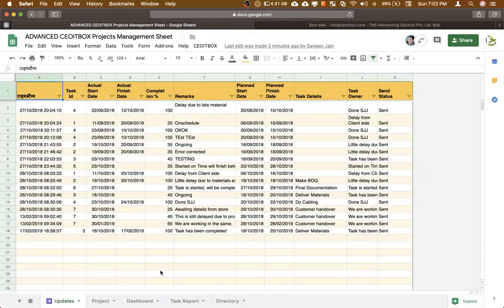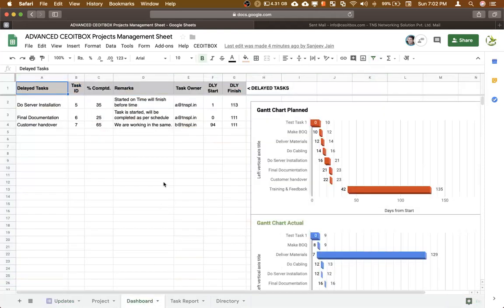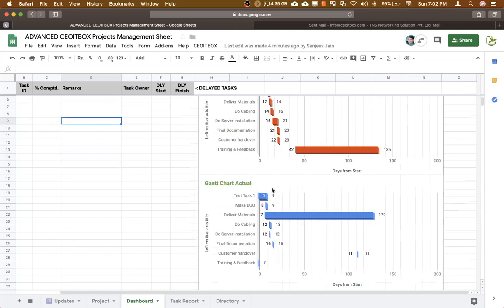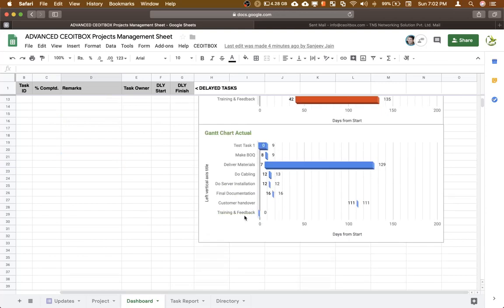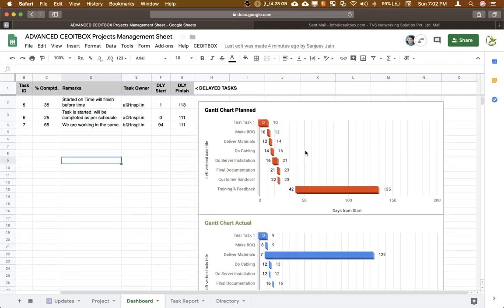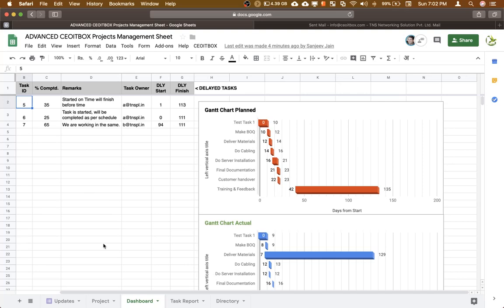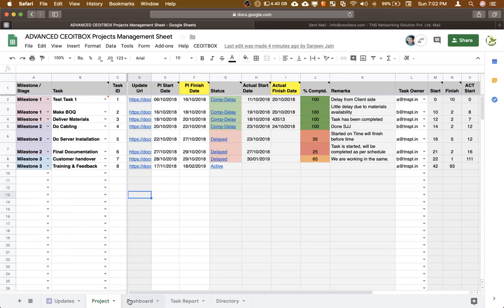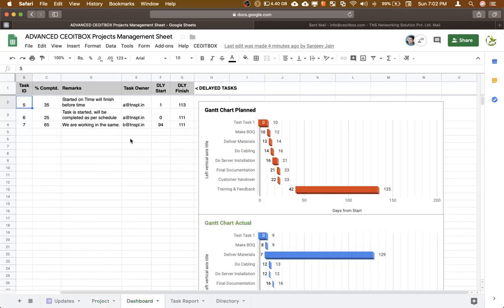Now we come to the task dashboard. This dashboard is an automated dashboard. First thing showing is a Gantt chart containing the planned activities and a Gantt chart of the actual status. So you can compare the two. Another thing you will see here, these are the three tasks that are currently being delayed. So you can focus. You don't have to see all the tasks which have been completed. You only need to focus on the ones that have been delayed.